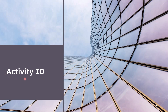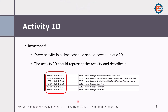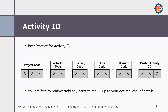Let's start with the activity ID. The activity ID is a numbering system and every activity should have one. There is a best practice for structuring it — you can have it as a random number, which is not good, or you can have it organized. My recommended way includes sections for: project code, then activity type, then building code, then floor code, then division code, then the master activity ID.